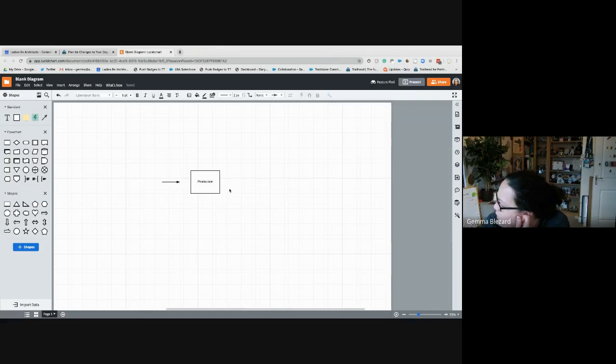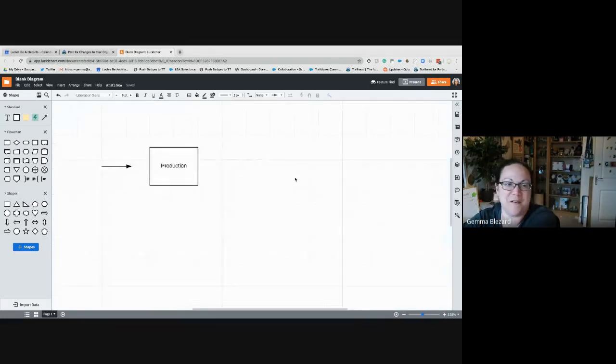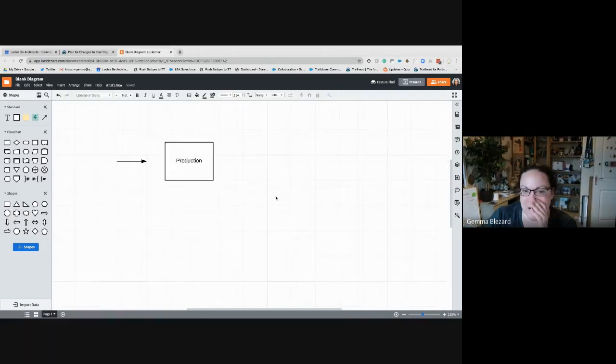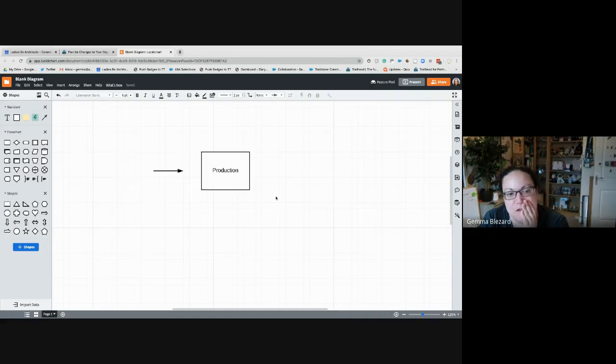For a brand new implementation, the pros to me are that you just configure once, you load the data once, and you're away. The cons are that once you've done it once and you know how much easier it is, there's a real risk that you could end up just continuing to build things in production and you haven't actually tested anything for any new functionality that you're building. The other disadvantage of building and migrating directly into production is that if something goes wrong, there are a few gotchas along the way.